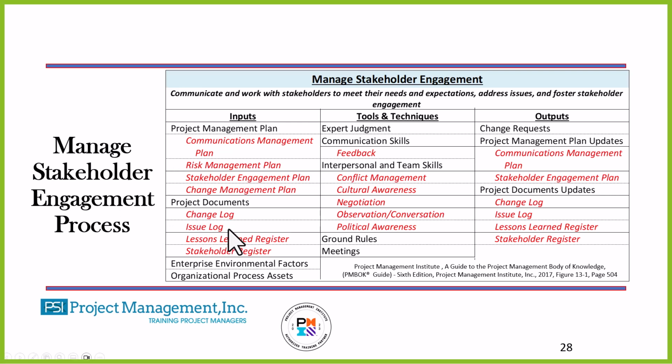Are there issues with the stakeholders that you need to be aware of? You know, all issues have to be worked. We cannot take any issue, put it on an issue log, and just let it lay there. All issues have to be worked, and someone has to have responsibility for solving or resolving those issues. You can take an issue that's small, and if you don't address it, it can grow into a huge problem, and you don't want that to happen.